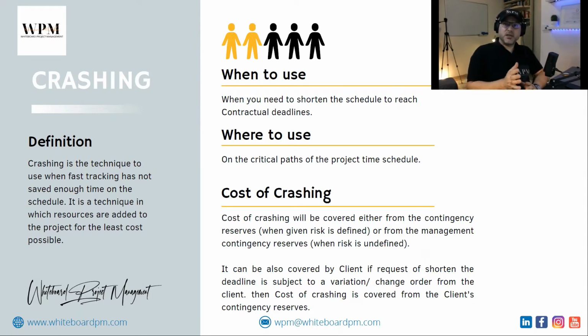So either you take it from the contingency reserve for the defined risks, or from the management contingency reserves for the non-defined risks. Or you as a customer, if you are requesting this, definitely you have a reserve for the project to take it from this.